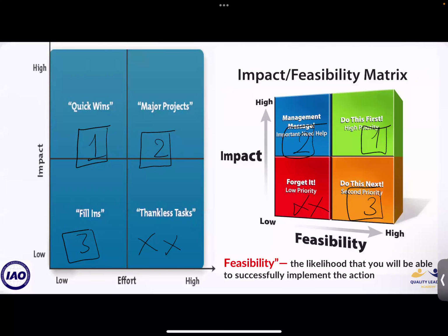Moving on, the priority matrix is where you display the problems or solutions based on their impact on the organization and the effort needed for implementation. So, for example, I'll show the relationship between the effort and the impact. But it doesn't always have to be effort and impact. It can be something else too. Like here, for instance, it's showing the impact and feasibility instead.